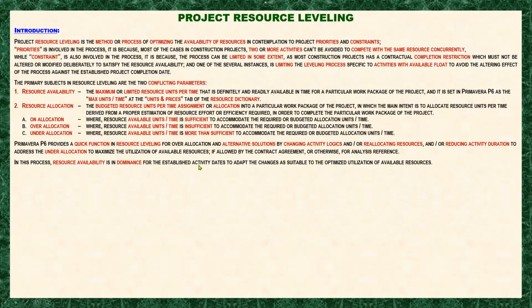Once your activity is over-allocated, the available resources will be distributed and it will affect your activity dates. If you really want resource leveling to do its job, it has to satisfy your available resources.